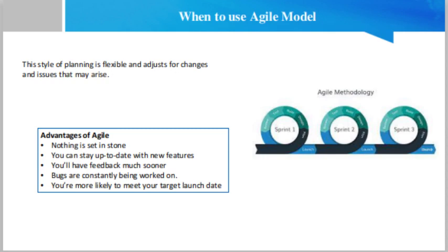This means your customers will be the ones testing your product out to find the flaws, and who knows what else is wrong. Now imagine your team was able to test for bugs throughout the build to see where holes and gaps need to be filled. Did the light bulb just click on? With agile, you are able to test each component as each sprint is tackled instead of waiting until launch to do so. By the time your first version launches, it will have been rigorously tested already.